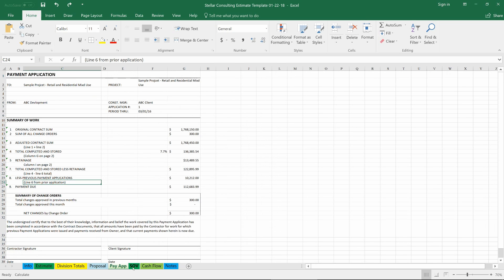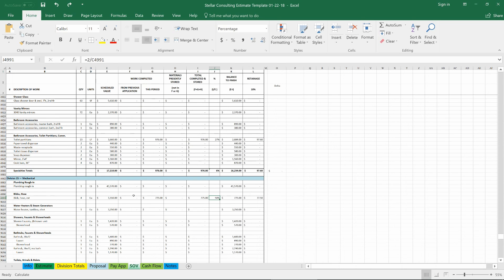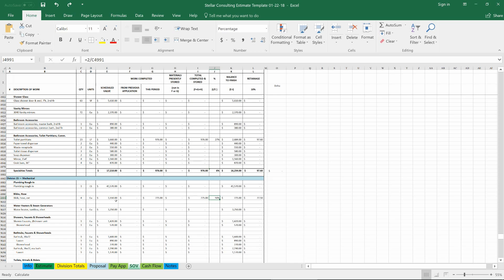And that ties in apples to apples with schedule of values. So everything is really straightforward apples to apples across the board from the estimate to the proposal to the schedule of values and then it would go on from there to create and maintain a historic database of costs as well in the same format.